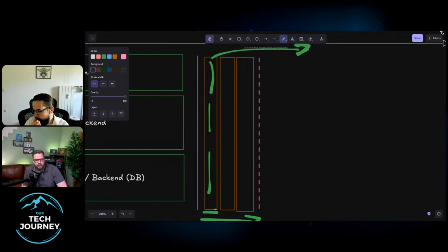So you have a very heavy front-end topic, for example, and the back-end team is just delivering an hour of work, and the front-end team needs to put in something like 7 hours. Then, of course, what are you going to do with the 6 hours of the back-end team? So it might make sense to already talk about the next slice. Can we prepare something for that, or can we help testing or something like that? But if that's the case, we're already talking about two teams.